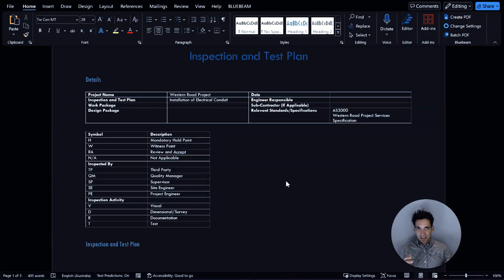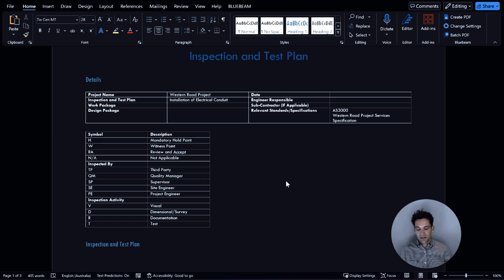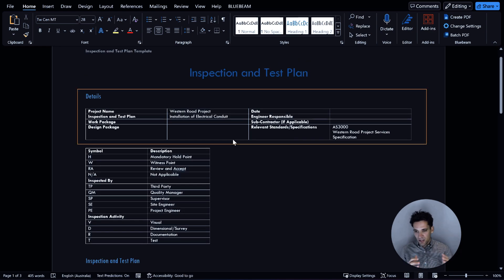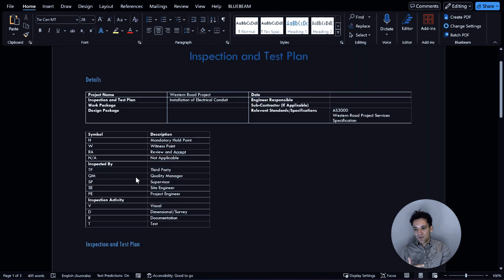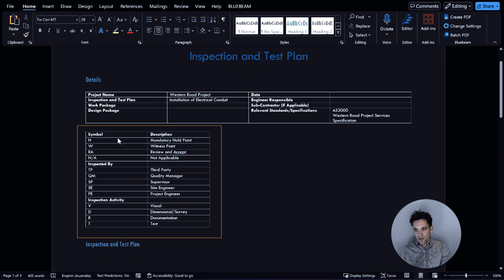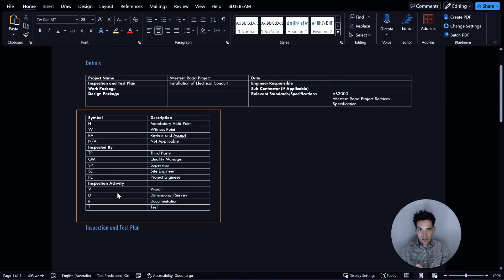Now we understand what an inspection and test plan is, let's look at an actual ITP. ITPs follow very specific structures. You'll have a heading with project details — the project name, scope of the inspection and test plan, what work packages and drawings it refers to, any applicable standards, who wrote it, and the date it was prepared. Then you'll have some definitions — the symbols, who is doing the inspections, and the different inspection activities.